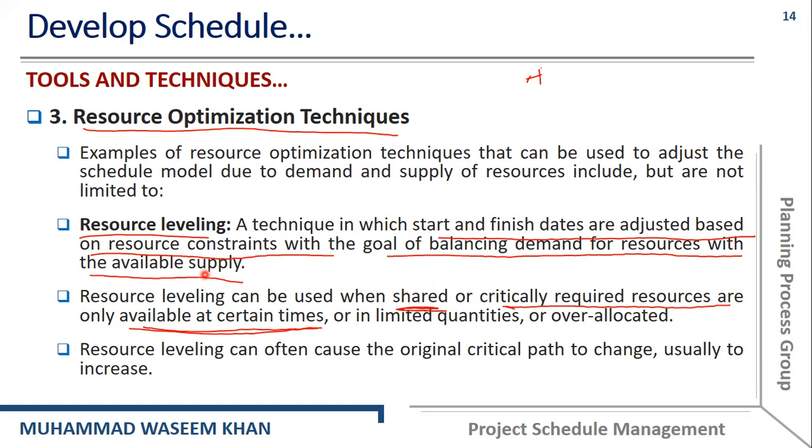And resource leveling can be used when shared or critically required resources are only available at certain times or in limited quantities.